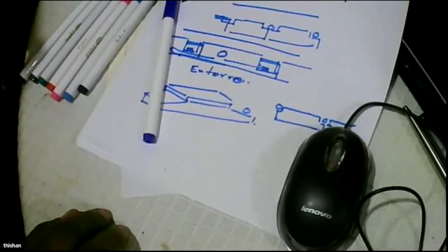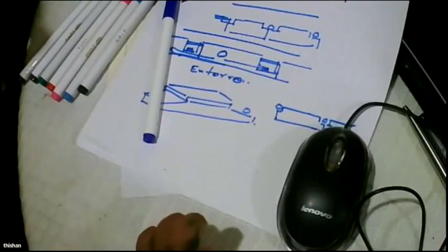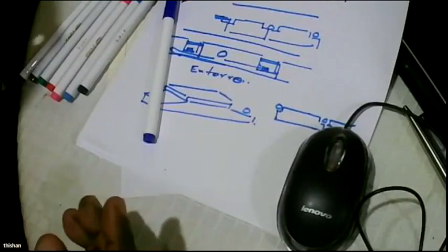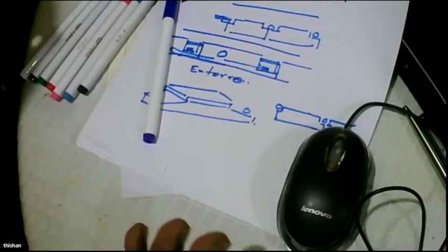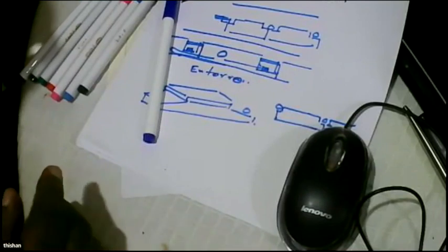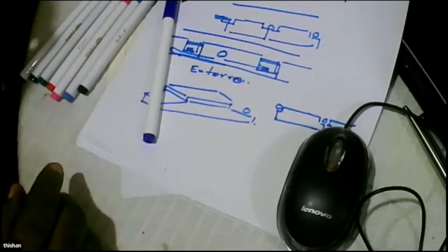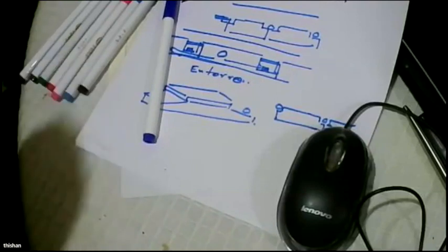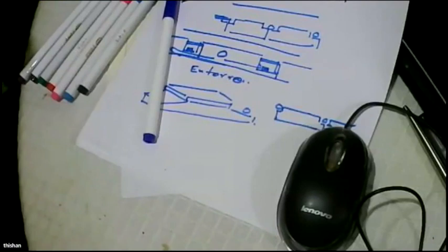So even if you design this as a 25 megapascal cube strength, that is enough, because we are not going to load the slab immediately after removing the props. You want few people walking and attending to the work, right? So as long as you are not going to store material on the slab, the moment the screed concrete cubes reach 25 megapascal, you can remove the props.